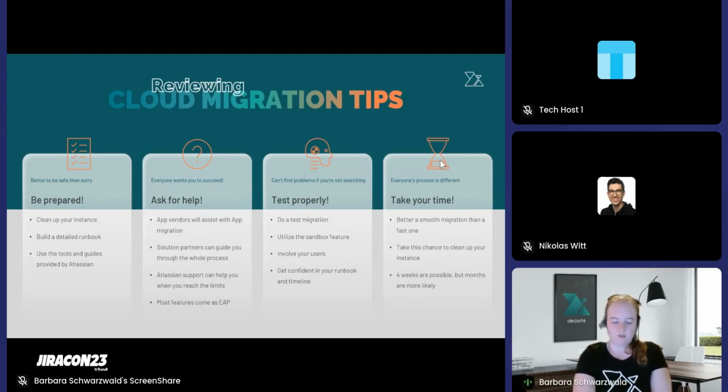So when you did the test migration and everything works great, you know exactly that if you do the production migration and follow your plan, your runbook, then everything will be fine as well. And this will also help you to note how long you will actually need for the manual tasks that might be required for some of the migration steps, so that you can plan your migration night or weekend or however your schedule is accordingly.